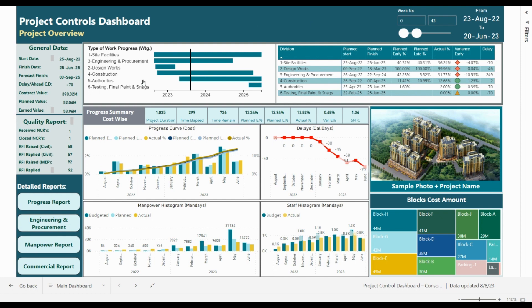At the top we have the graph presentation of a high-level summary of the project with details for start date, finish date, progress percentage, variance, and delays. In the middle we have a time analysis for the time elapsed, time remaining, progress analysis, and the SPI.